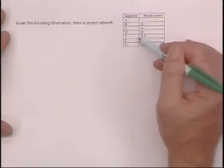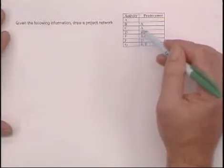both B and C need to be completed before E can start. So we're going to do activity on the node, and each activity is going to be represented by a box.